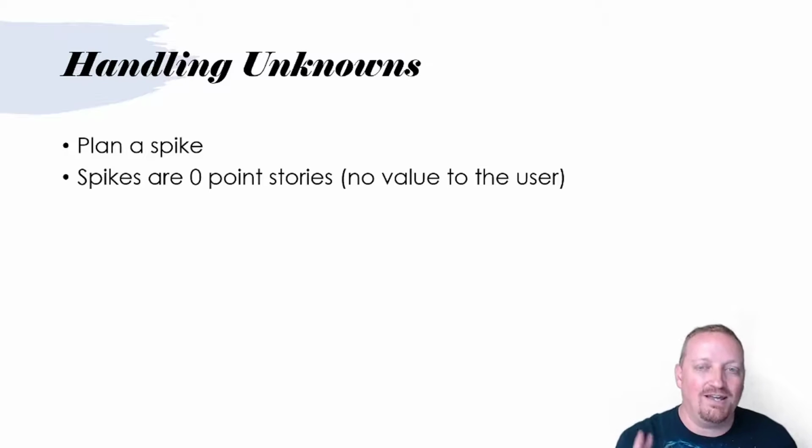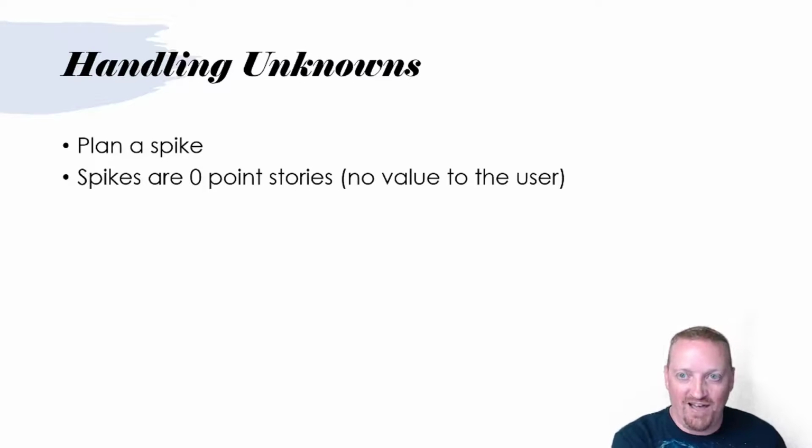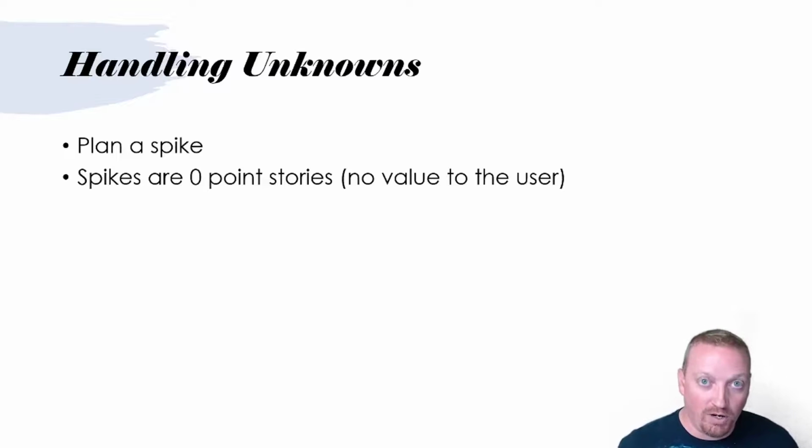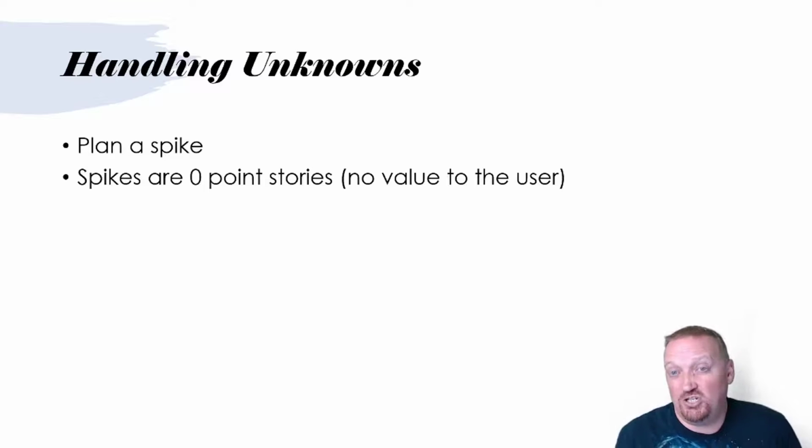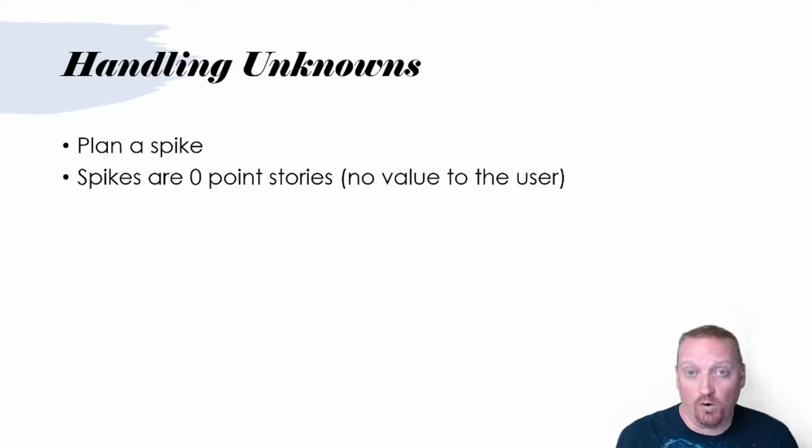But I would say that it kind of goes back to the, okay, what is that default value and how does it relate to the other values that you've decided in terms of effort, right? Do you reapply the rubric? Do you try to say this is a complex spike? Do you say that there are unknowns about this spike? Well, inherently a spike is about unknowns. So, I mean, it's going to be obvious. It's always going to be at least a 2 there, right? Or I'm sorry, at least a 4 in that case.